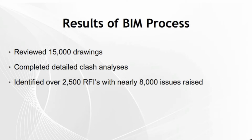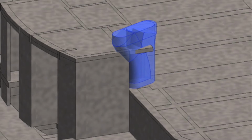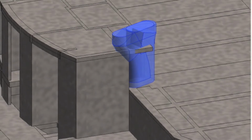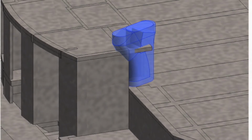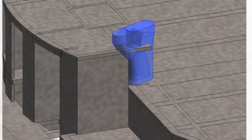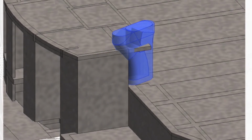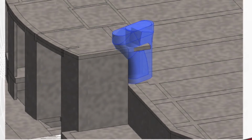Some examples. The structural engineer designing the framework for the vent building, a separate structural engineer designing the piers for a bridge structure. Their alignment doesn't quite match. The model will identify a clash. In this case, we were able to reconfigure some of the structure for the vent building, problem solved. But actually being able to see 2 different engineering disciplines interacting was very powerful.